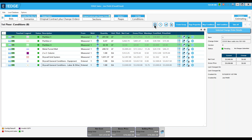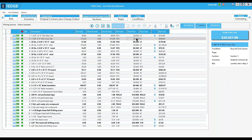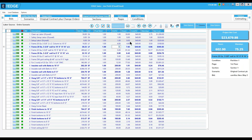Now let's see what the pricing screen looks like. I see everything that's in the current project in light gray — that's not editable; it just shows me what's there. The bold numbers are coming from my change order. Since I copied an existing condition, the pricing from that condition came in as well. Had I brought the condition directly from the group database, whatever pricing was in the group database would appear here instead. I'm not going to make any changes to the material.